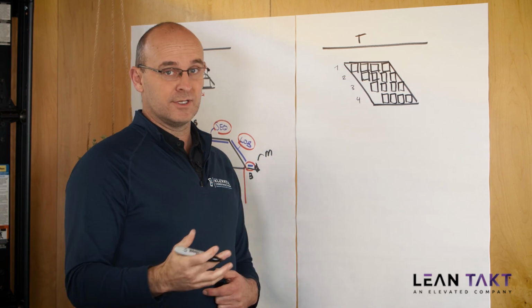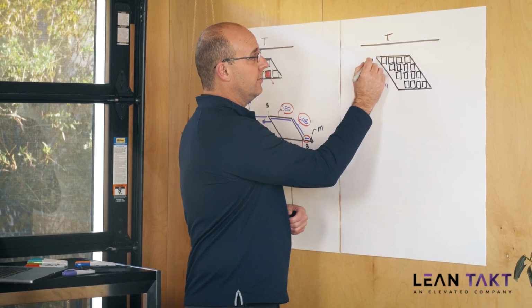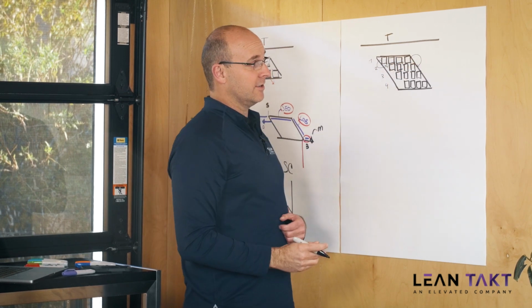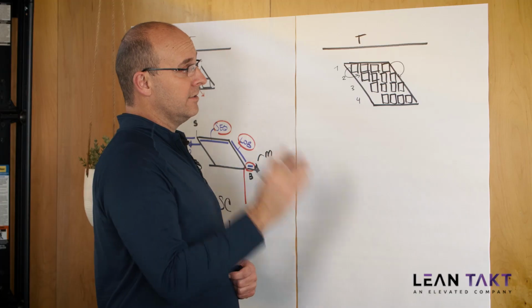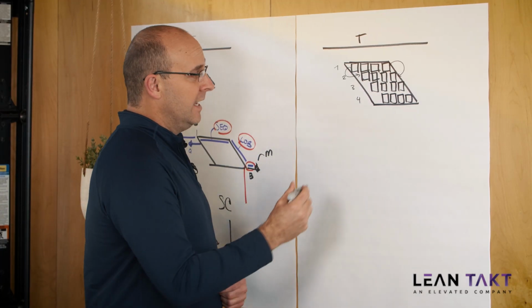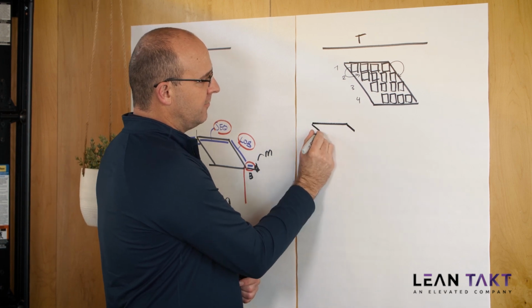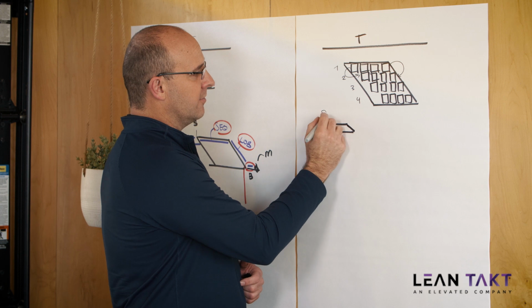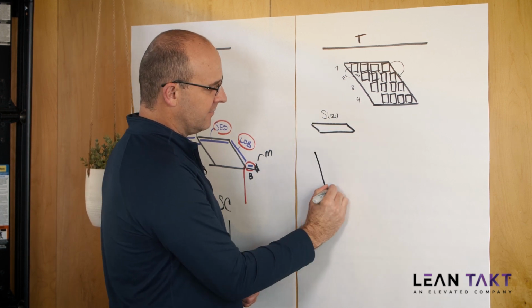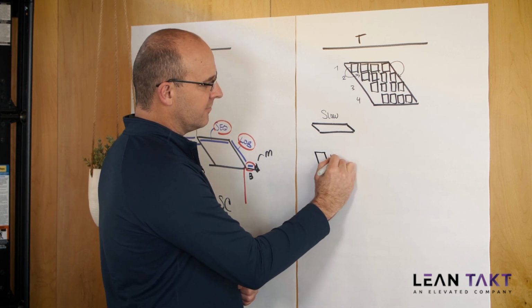So just so we're on the same page, your shape is based on the stagger from wagon to wagon and how you finish on that stagger, and the takt time and the number of zones. So if you ever see a long phase, that means that your phase is likely going slow. If you ever see a really inclined, semi-vertical one, that means you're going fast.